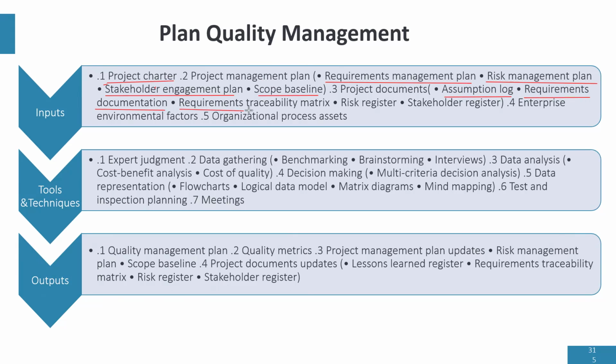We also have the requirements traceability matrix, which helps us to track requirements and ensure that all of them are met. We have the risk register, where we can look at risks that can impact quality, right here. And we also look at stakeholders who can be impacted based on the quality of the project and which part of the project lifecycle they are interested in terms of quality.